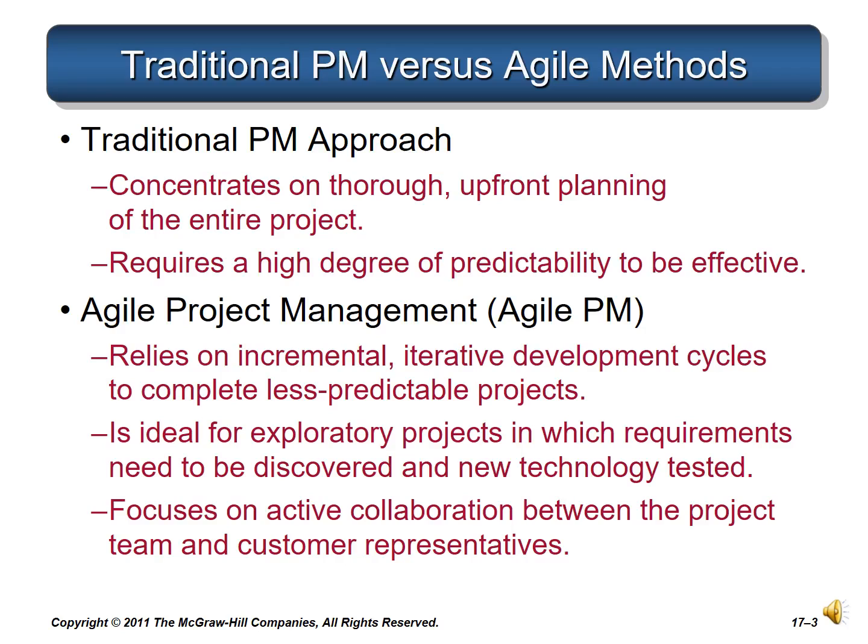Once the project scope has been firmly established, every detail of the project is defined through the work breakdown structure. Most problems and risks are identified and assessed before the project actually begins. Estimates are made, resources assigned, adjustments made, and ultimately a baseline schedule and budget are created. Control of the project is a comparison of plan versus actual, and corrective action is taken as required.